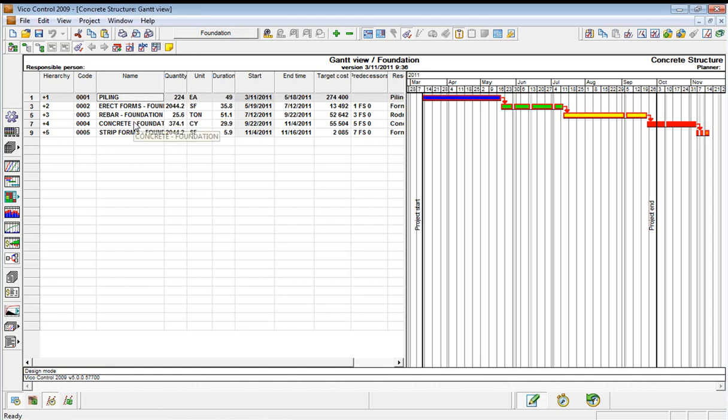We'll rebar the foundations and concrete them in these zones as well so that we can have a compression to the overall schedule. At the moment, you can see that it's a number of months for the schedule.